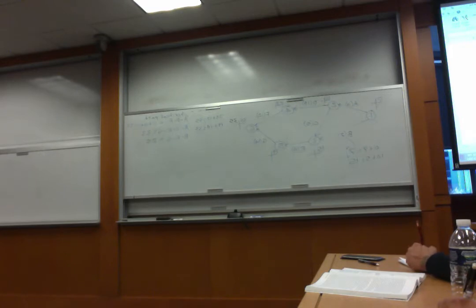So in other words, you're going to use 35 plus 12 and 35. No, now I'm going to be subtracting. I'm going to put 35 going down. I'm going to be going down from 35, and if I do it right, I should end up with a 0 at 1. So the idea is now subtracting, going backwards. I started with a 35, and I'm going to be subtracting. If I do it right, I should be able to end up with a 0.